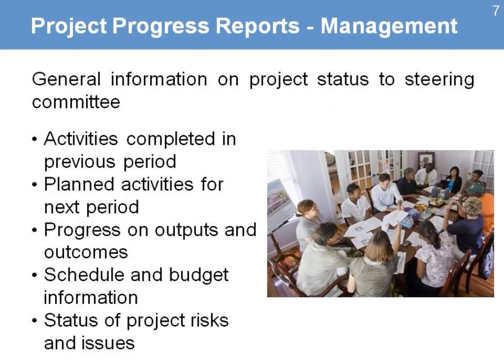The report contains the following. All the activities completed in the previous period. So you have to tell them what you have achieved. All the planned activities for the next period. So what you're planning to do. Any progress on outputs and outcomes. Then information on the schedule and the budget. And the status on project risks and any issues.